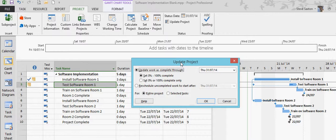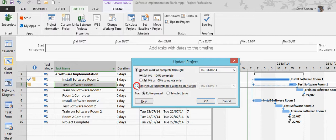Now in this box it says to reschedule any uncompleted work to after the date that is set at the top, which is the status date. If I just tick that option and click OK,